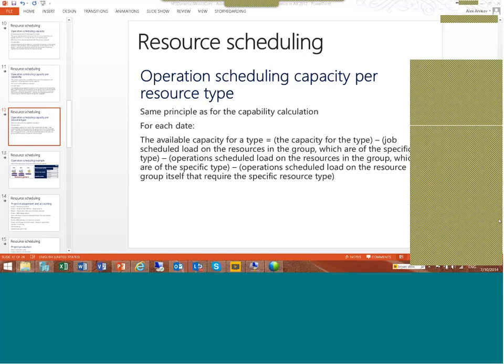I want to understand how you bring data to WBS. You said the WBS is taken to forecast and forecast to production. Yeah, so basically WBS is your estimation. This is the work breakdown structure, how your project will look, the breakdown of your tasks. So this is literally an estimate. And then this estimate is transferred for scheduling into the forecast. So the forecast is something more tangible than WBS, and you say you're expecting something. It's like a planned production order, but in the project realm.